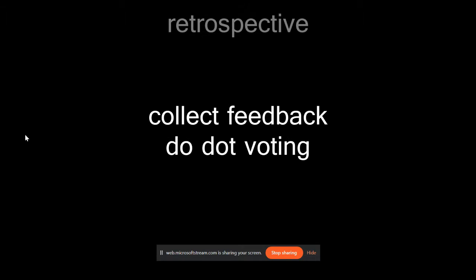All right, next up is retrospective. One thing that Mark, Kara, and I have tried that seems to be working out pretty well is to collect feedback from the team before the meeting starts. So, for example, you've got like your what's working well, what's not working well, next action items to take. You get the generic format. So why can't you just propose that to the team in chat beforehand? Have them sit back, think about some of the issues and situations that happened in the past sprint, and then just write them down there. Write them down in that retrospective tool.